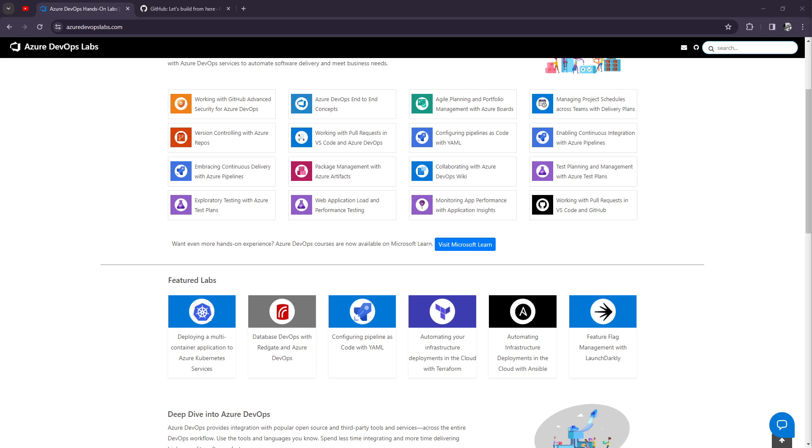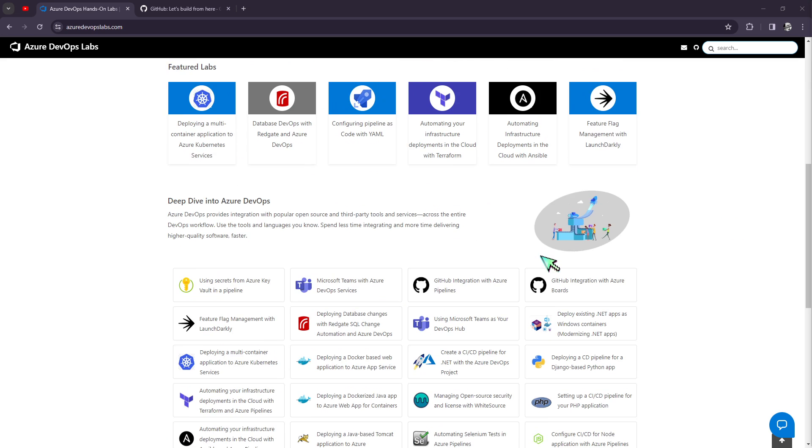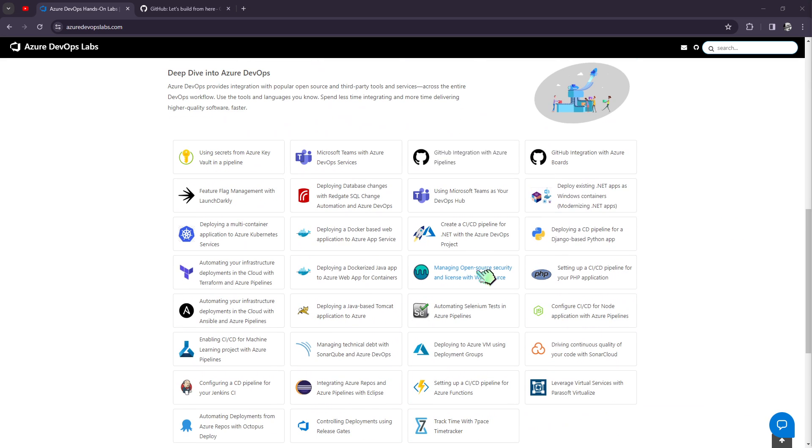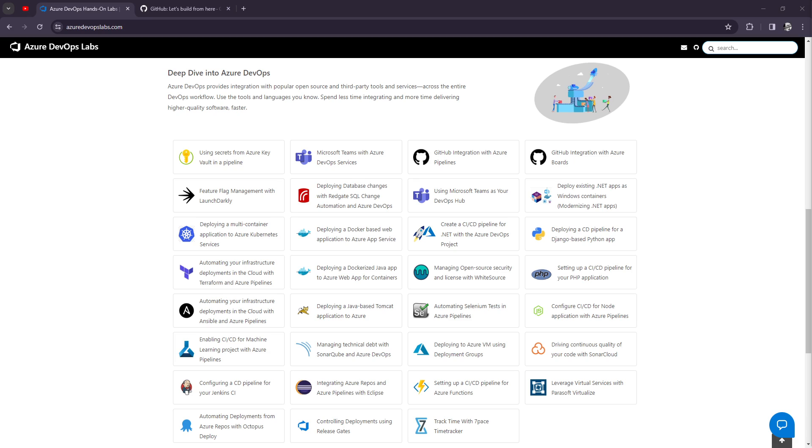Now, how about Agile? Agile in Azure DevOps has some similarities to Scrum but some differences also. Like Scrum, Agile has epics as the highest item in the project taxonomy. These also live in the portfolio backlog and can be split out into features once you want to get features done on the Kanban board or task board.